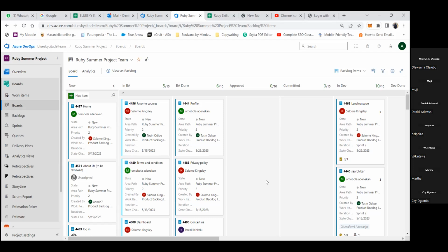How much effort has been completed with the manual part that you've done? He says, oh, okay, so the manual part has been done is an effort of 2. Remaining, okay, so the automation that is remaining is an effort of what? Is an effort of 3. So on the story that is moving on to done, you change the effort on it to 2, number 1.